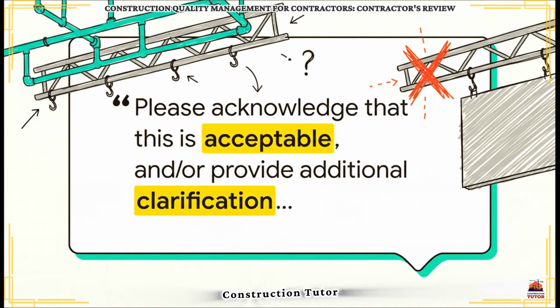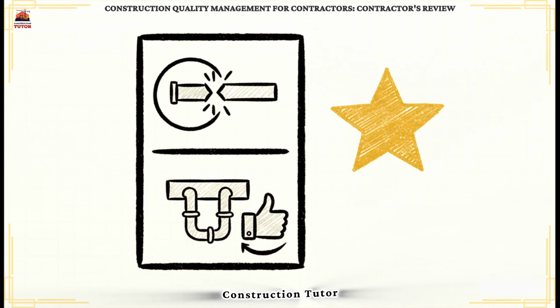So, for this first one, picture this. The contractor found a major conflict. The sprinkler design showed pipe hangers attached to bar joist, but the architectural drawing showed that exact same spot was going to be covered up by drywall. Whoops. And this is a textbook example of a perfect Category A RFI.